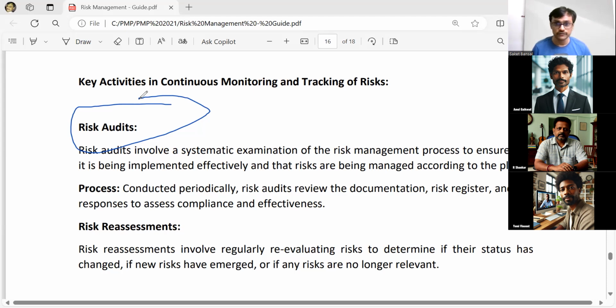So in a retrospective meeting, we may discuss, are we doing good prioritization and management of our risk? Have we done a good sprint planning? Have we identified the risk? Have we really taken care of those risks during the sprint? How can we avoid the mistakes which we have made in the current iteration? What should we change in our risk management approach? Should we change our risk categories? Should we change our risk responses in the future so that we do a better risk management? So that's the word, we call it risk audit.